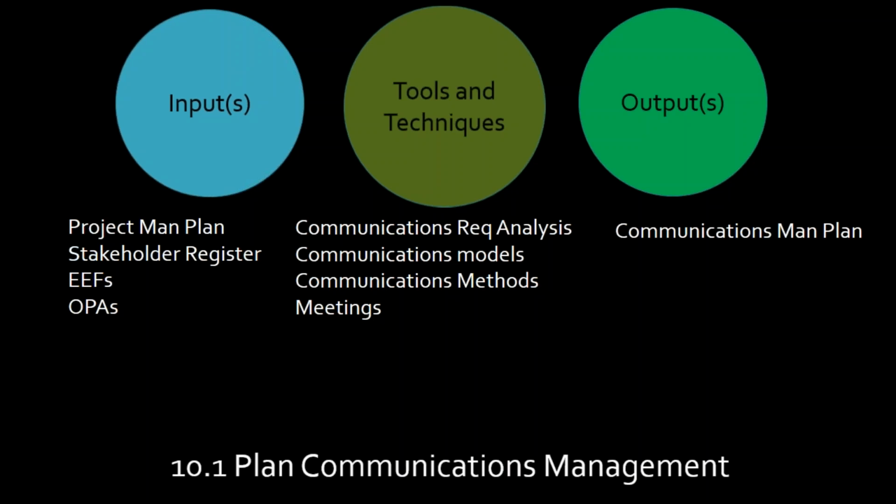Your output is a communications management plan, much like I just showed you in the last screen as we were leaving stakeholders. It's another Excel spreadsheet, and it's actionable. I'm going to be calling out who gets what, when, why, all that kind of thing. And it's a plan, almost like a Gantt chart, that communications are happening when I want them, where I want them, going where I want them, et cetera. I plan that all out here. Of course, the effect of progressive elaboration.